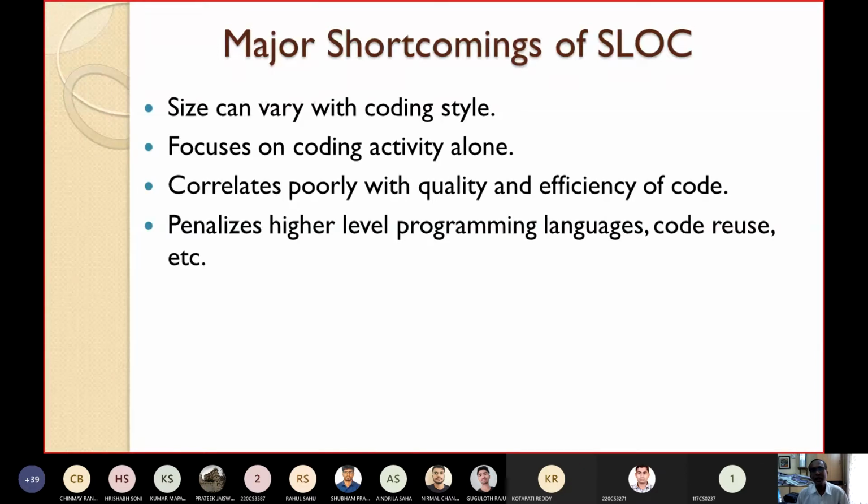If you are using code reuse by using inheritance, then your project size, the LOC, will be less. Then you will be considered a programmer having less productivity. So what does it mean? LOC penalizes higher level programming languages, code reuse, etc. But actually you are using the advantages of high level languages or object-oriented languages, but LOC does not recognize that.